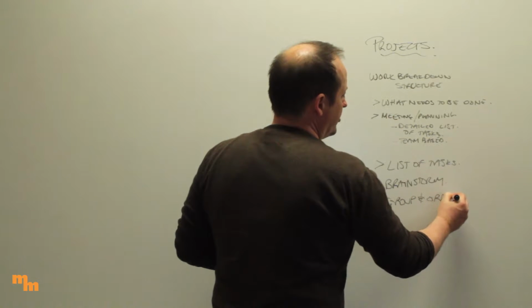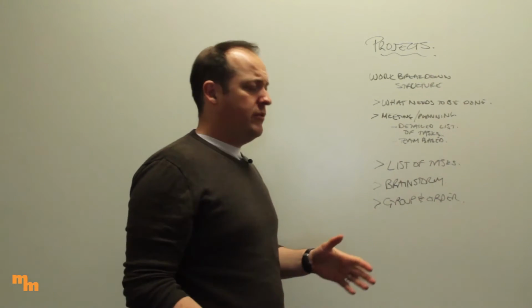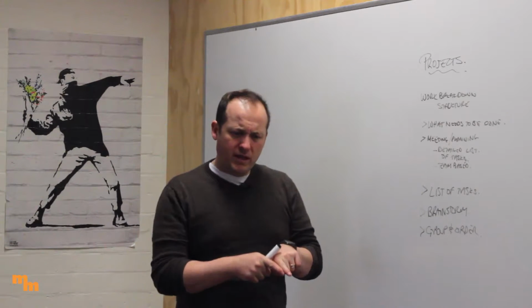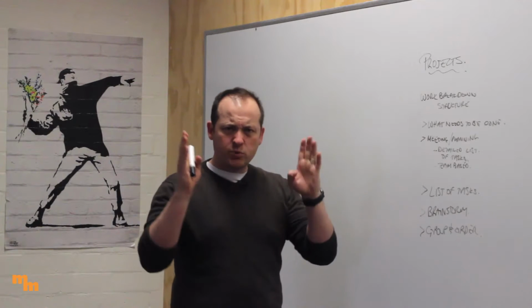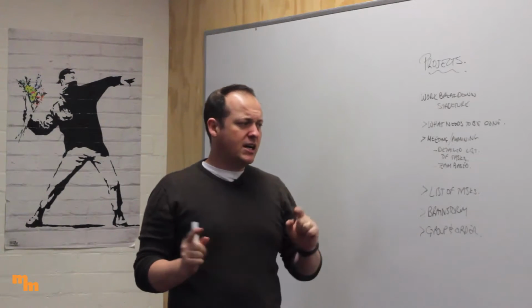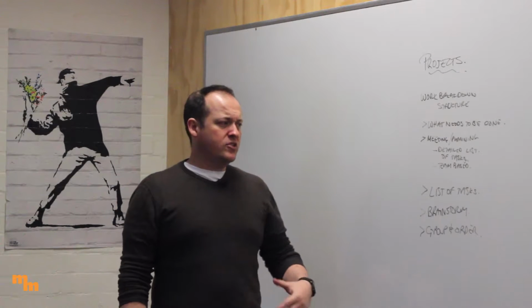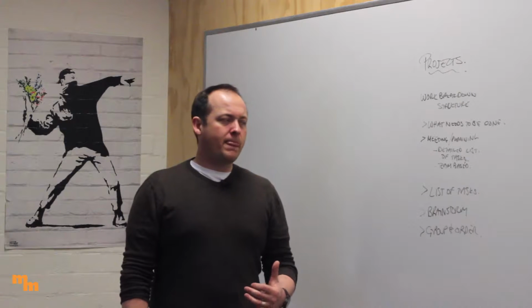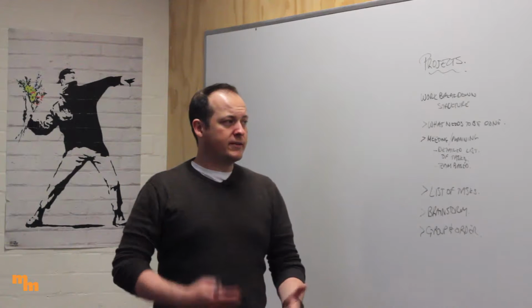Okay, so put them into the logical order, group all the tasks of like things so you can see if you can save yourself. Okay, well I've already got this person calling the council to book the park, so maybe they can also book the cleanup through the same bunch of people. And this is where once we know all the big things are and we've broken down those tasks, we can start to see is there any time saving between them, or do they have to be at certain times or a little bit different. All right, so there's a whole bunch of different activities that go into that, and we'll talk about them next.